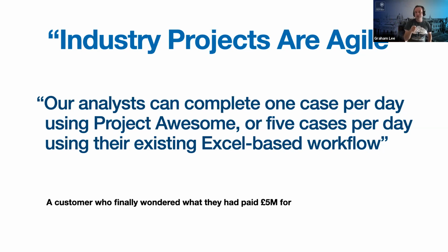Unfortunately, the person we were talking to at the customer site was the person whose job it was to keep our relationship sweet. It wasn't the person who had to use the software. And this is a common practice in industry software engineering, to build what the customer wants, not what the user wants, forgetting that those are different people.